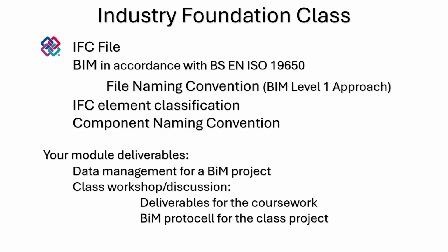That's nice and easy. In reality though, very seldom does that work, because most firms do not have everything in-house. They'll be relying on external structural engineers, external architects, or this or that, and they have to come together and agree upon a protocol. If another discipline is brought into the fold later on in the project, they'll have to adopt that protocol agreed at the very start. Usually what will happen in real life is the bigger firm will probably dictate that we want to use our protocol, and the others will probably just agree because it's usually pretty good, or they'll adapt something to start with.